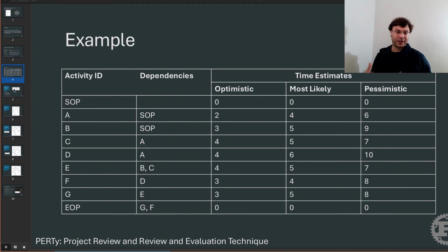In reality, and we'll get to how we implement PERT, we just want a duration for each of those tasks, and we sample from a distribution. This one gives us a constant value that we can use in our tasks, or each task could have their own distributions. They could be uniform, triangular, binomial, whatever they may need to be to represent the uncertainty in the time it takes to complete a particular task in a project.